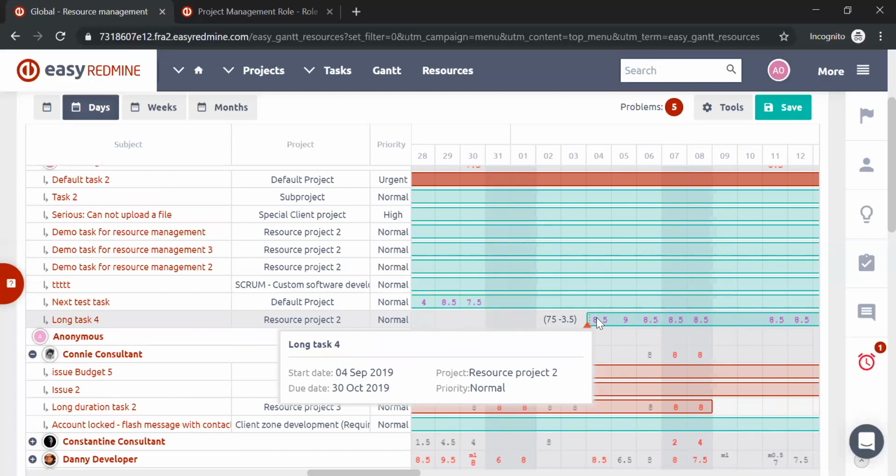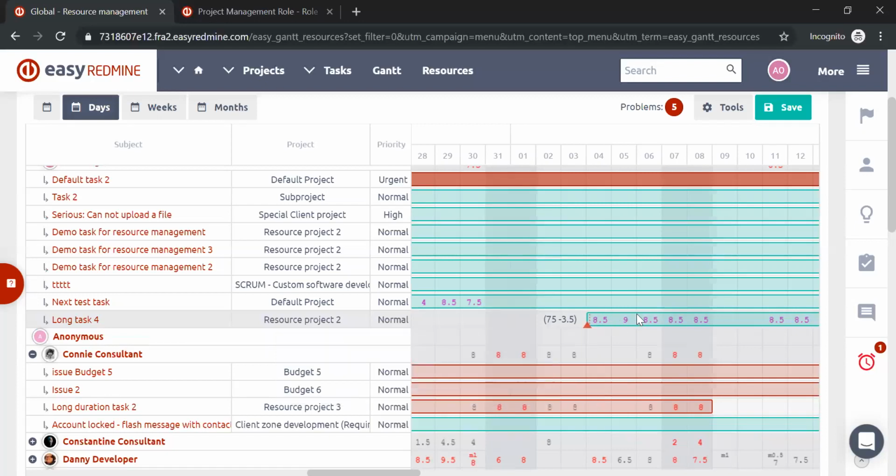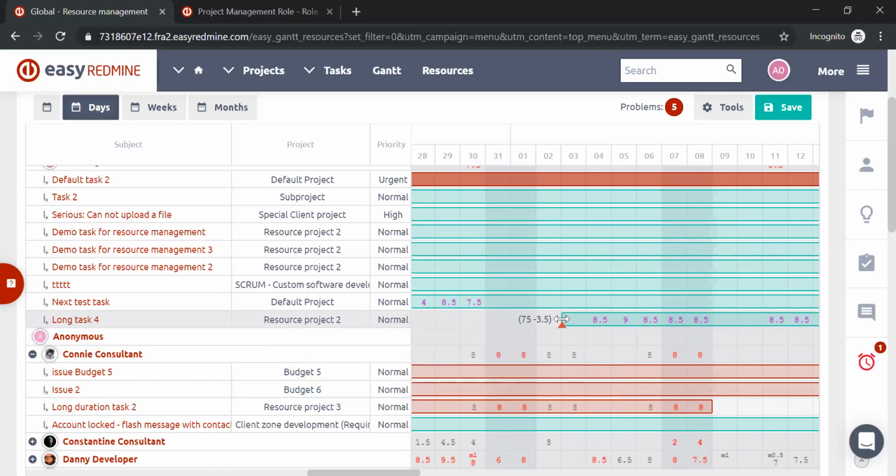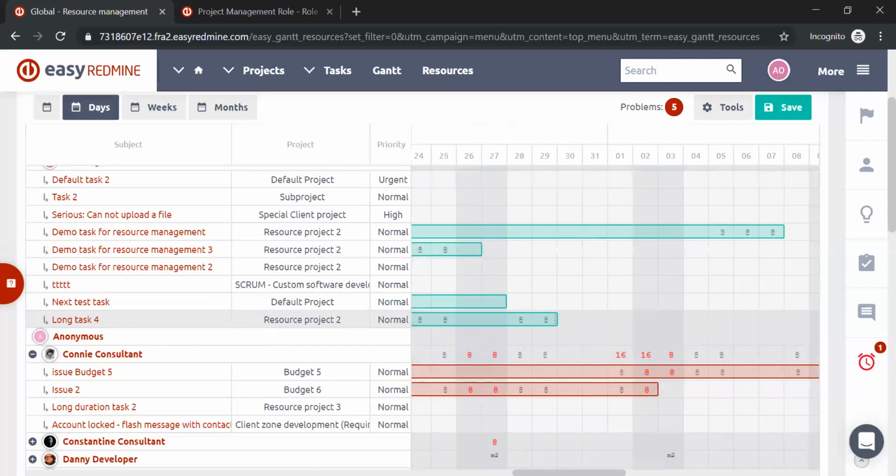And also when you move a task, we can be moving the tasks back and forth, as you can see. As I said, it works like when you're working with Tasking gun, just that over here you are focusing on the resources. When you move a task and drop it over a weekend or vacation of the assignee, the number of working days in the task duration has to remain. Therefore, it automatically prolongs the due date. So if we reduce it from this side, it has to get longer at the end simply because of the allocation of the numbers on the task.